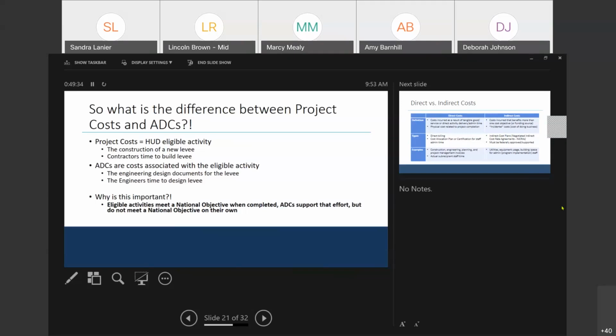The environmental review, those are the things that have to happen. Anything related to acquisition. I mean, you're not going to be doing the appraisals, but you're going to be handling all of the scope of work write-ups to procure the appraisers. You're going to be helping and assisting with that offer being made to that property owner. So any of those activities that pull that string on that activity, then that is what would normally be seen as work deliverables in that contract. Does that answer your question? Yeah.